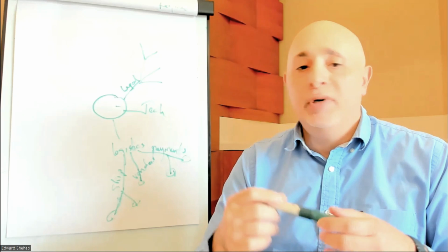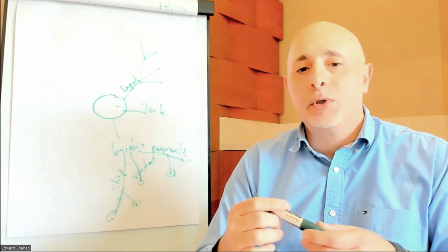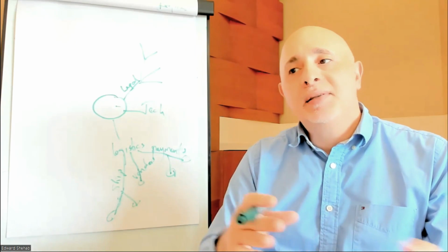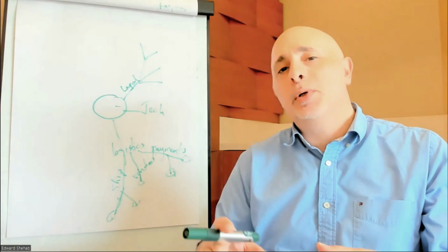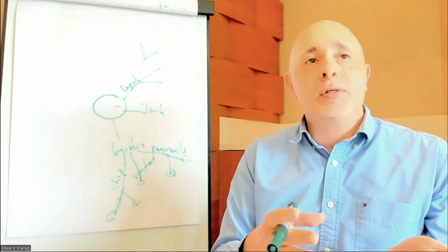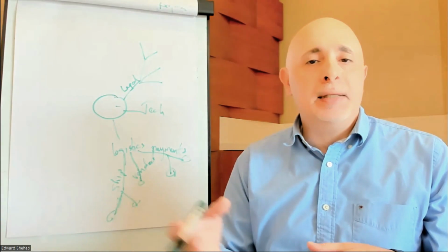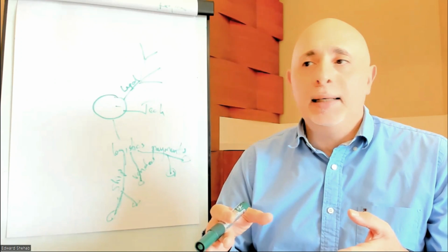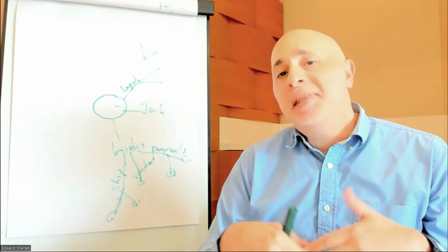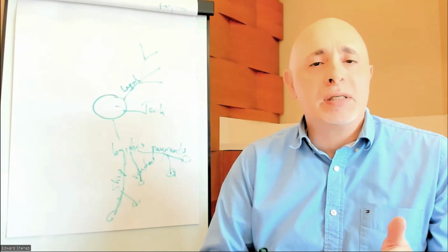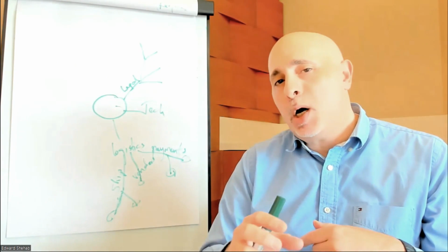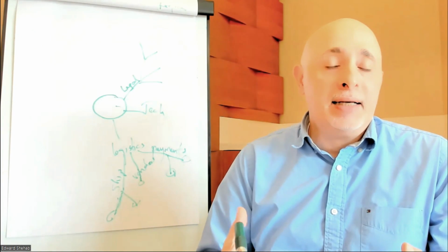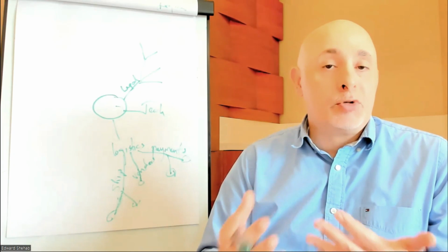I typically tend to review every document associated with a project. So this could be a contract, if there's a contract, a statement of work, or a business case. So these are official documents that I look at, but I'll also look at the team structure, the organizational structure, processes that are documented that I think I will need inside my project. In executing my project, I'll look at historical records also. Anything that is documented, published, an article from the supplier that references, for example, the product that we'll be using or implementing. Anything that I get access to, I'll review all of these to extract the risks that I can identify.